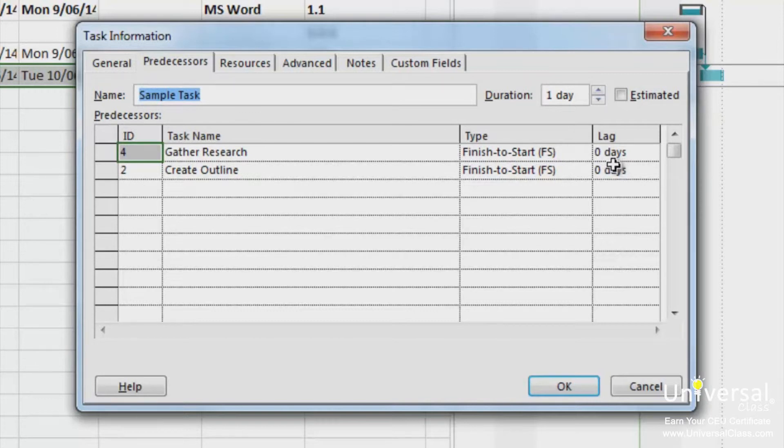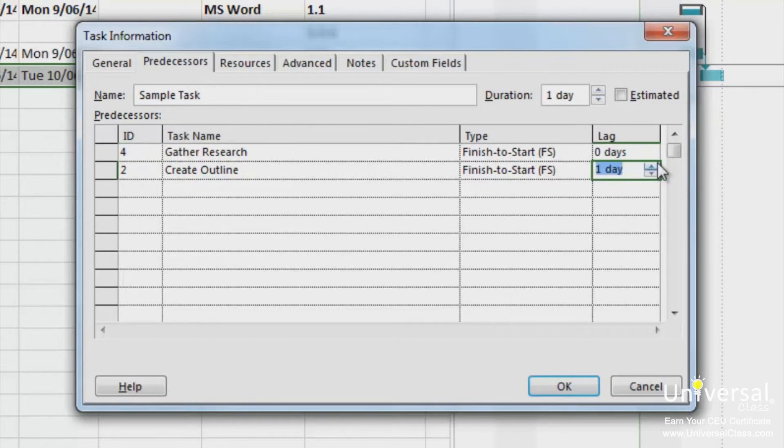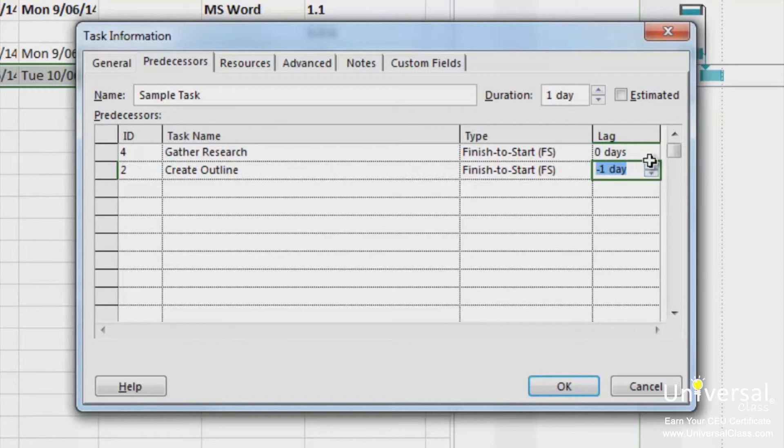To add lag, click up to a positive number. Or for lead time, decrease to a negative number. Remember, days are the default timing. You can change this to accommodate your timings.